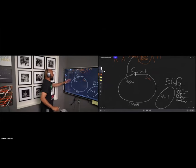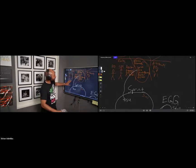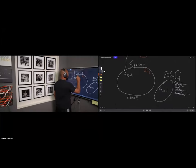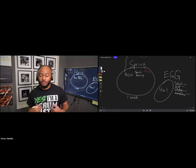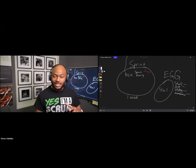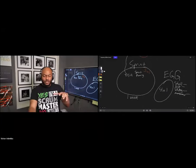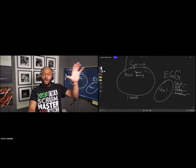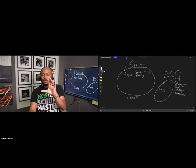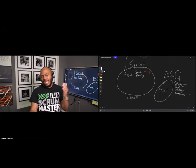The next thing that happens within the sprint is sprint planning. Sprint planning happens at the beginning of every sprint — in our program, we do it on Monday. Sprint planning is when the development team sits with the product owner and plans what they're going to complete for the current sprint. That's when they move cards from the product backlog over into the sprint backlog.